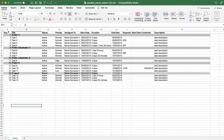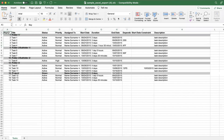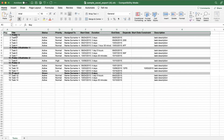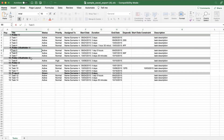This format shows us all of the columns you can use to import — not all possible columns, but the ones easily available for you to utilize. We can use this to import at least some basic data, and you'll see some structure here. When importing something as a folder or a project, it has to have a forward slash in front of it. If you want to add a subfolder, you can add that with a second set of forward slashes.